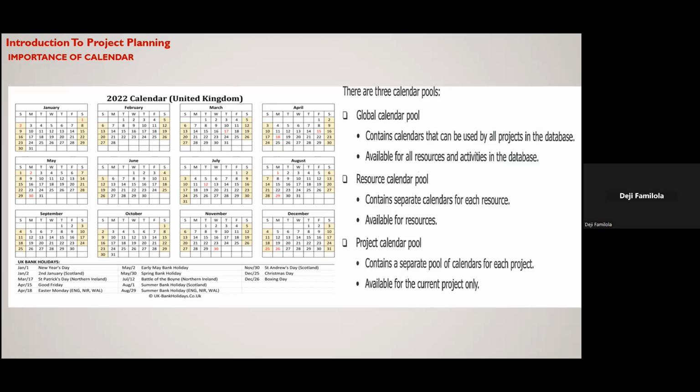So you need to work with them, ask them questions, and they will tell you how the calendar works. They might tell you, we work Monday to Thursday, 10 hours per day. Then on Friday, we only work 4 hours. Then on Saturday, we work 8 hours. On Sunday, we work 8 hours. So your calendar must reflect that. So calendar is key.